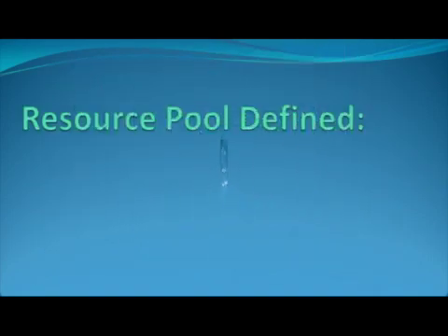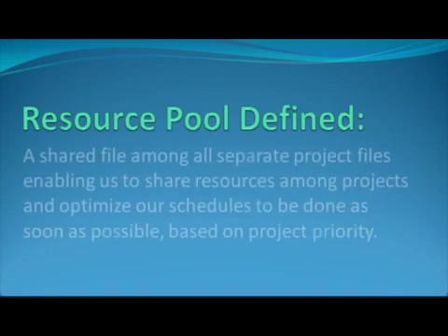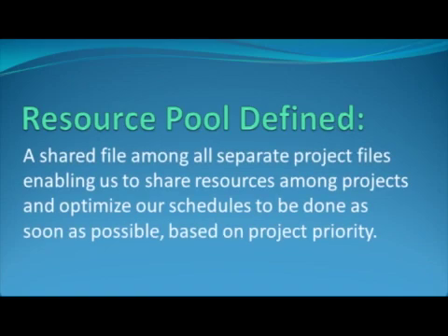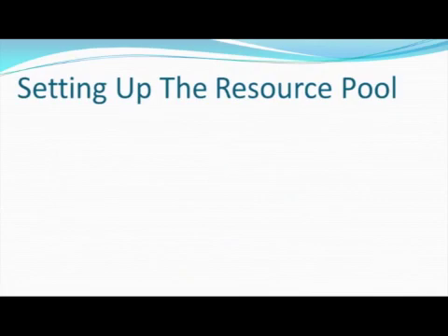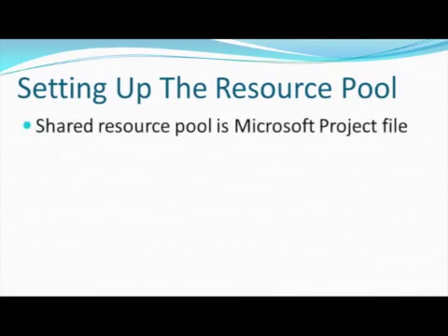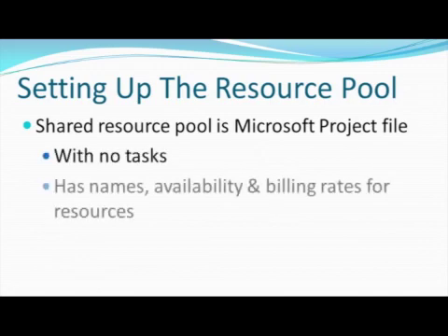So let's talk about creating a shared resource pool for the first time. The resource pool is a shared file among all the separate project files so that we can share resources among projects and optimize our schedules to be done as soon as possible based on project priority. To set up your resource pool, the first thing we do is create the shared resource pool. The shared resource pool is a Microsoft Project file with no tasks, but it has the names, overall availability, and billing rates of everyone who works on projects.